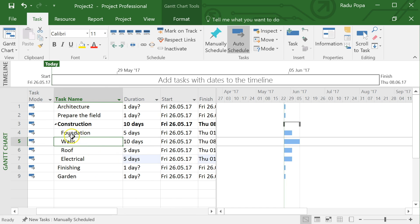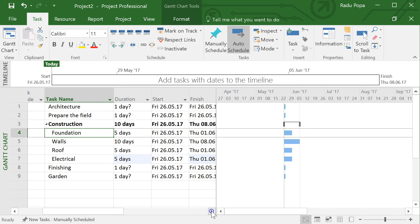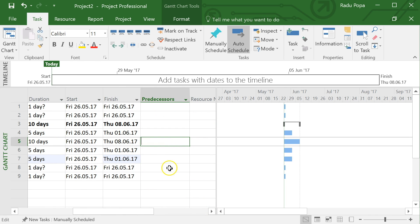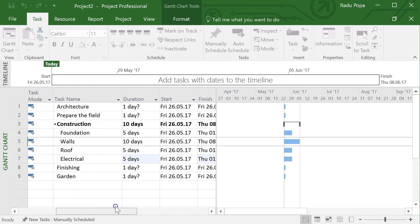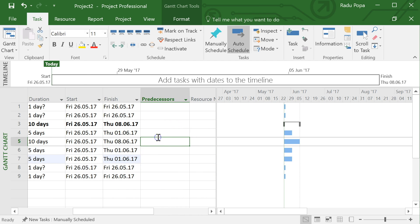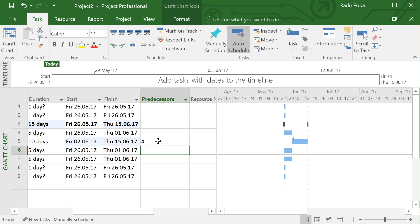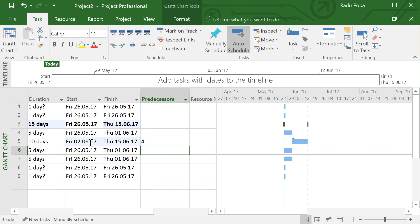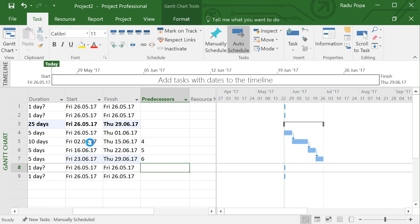I can't build the walls until I have the foundation, so the walls task depends on the foundation. If I scroll right I can see the 'Predecessors' column. For the walls task I can type in the row number of the foundation task, making walls dependent on foundation. Similarly, I can write multiple predecessor numbers for a task that depends on several others.